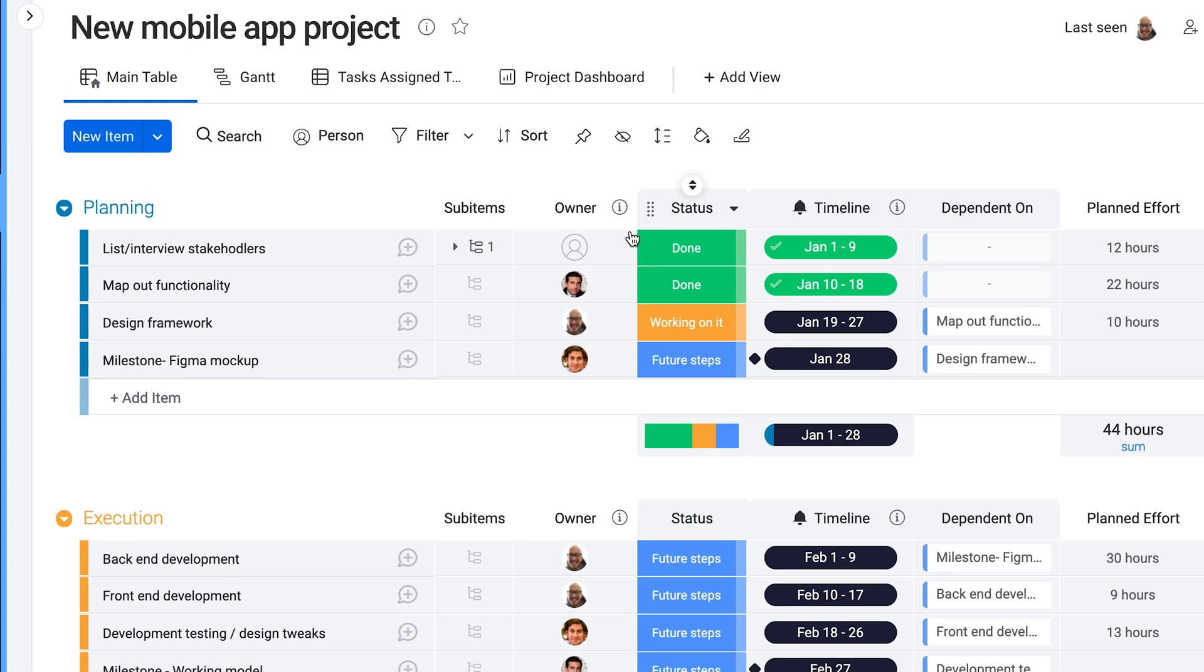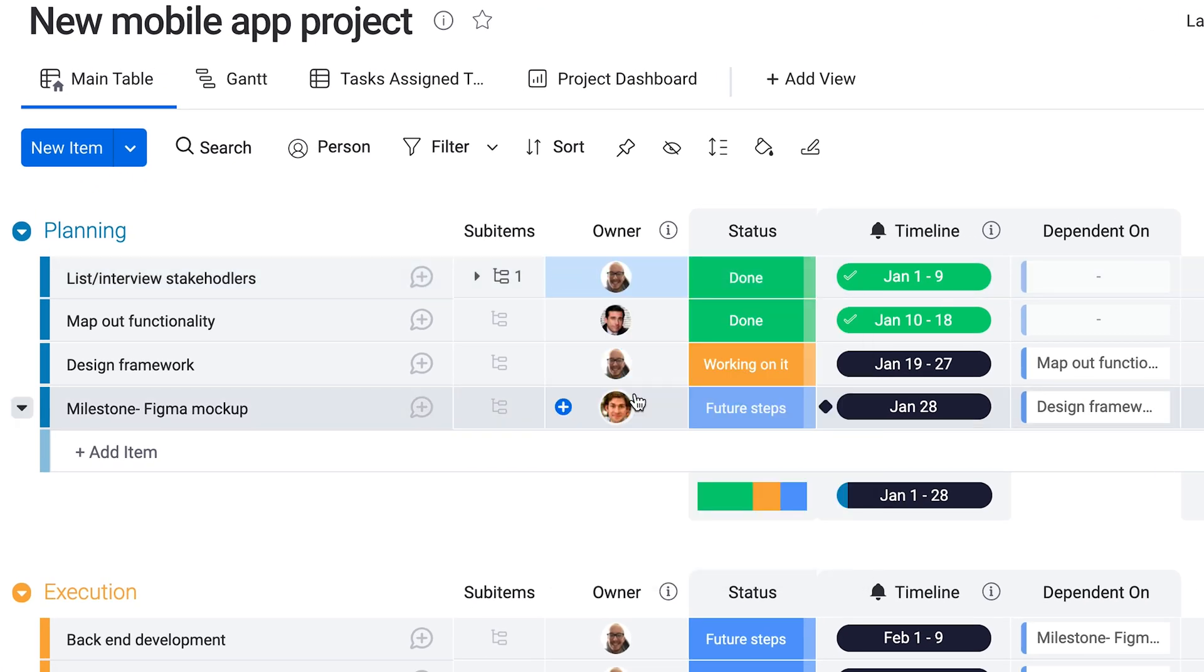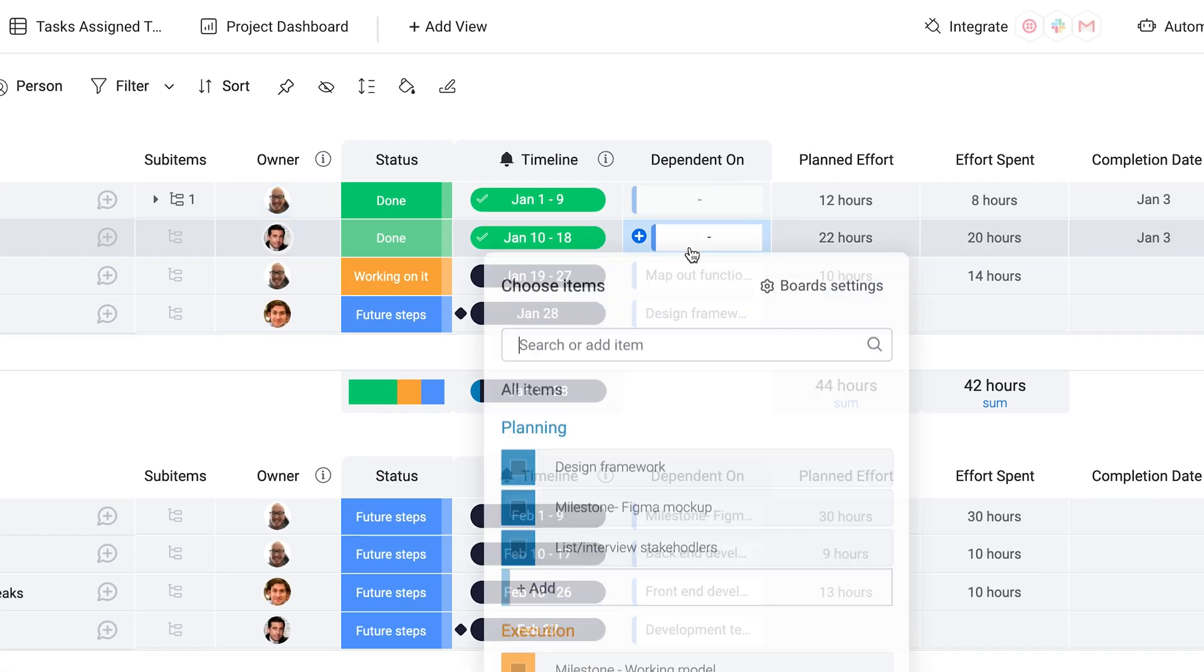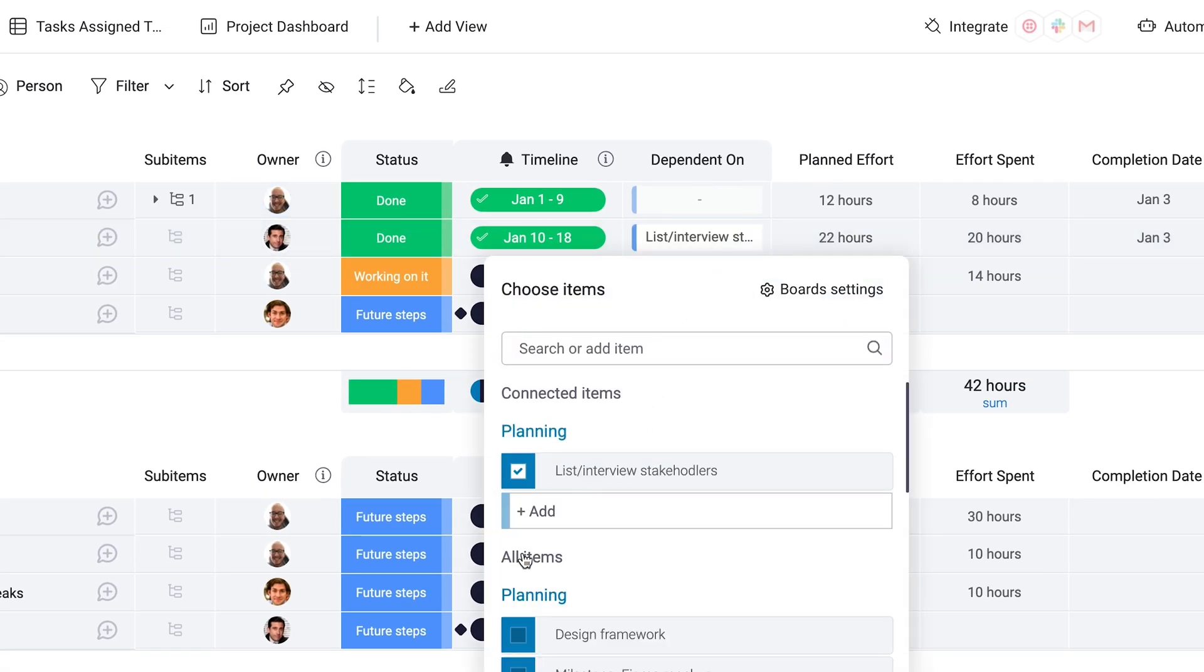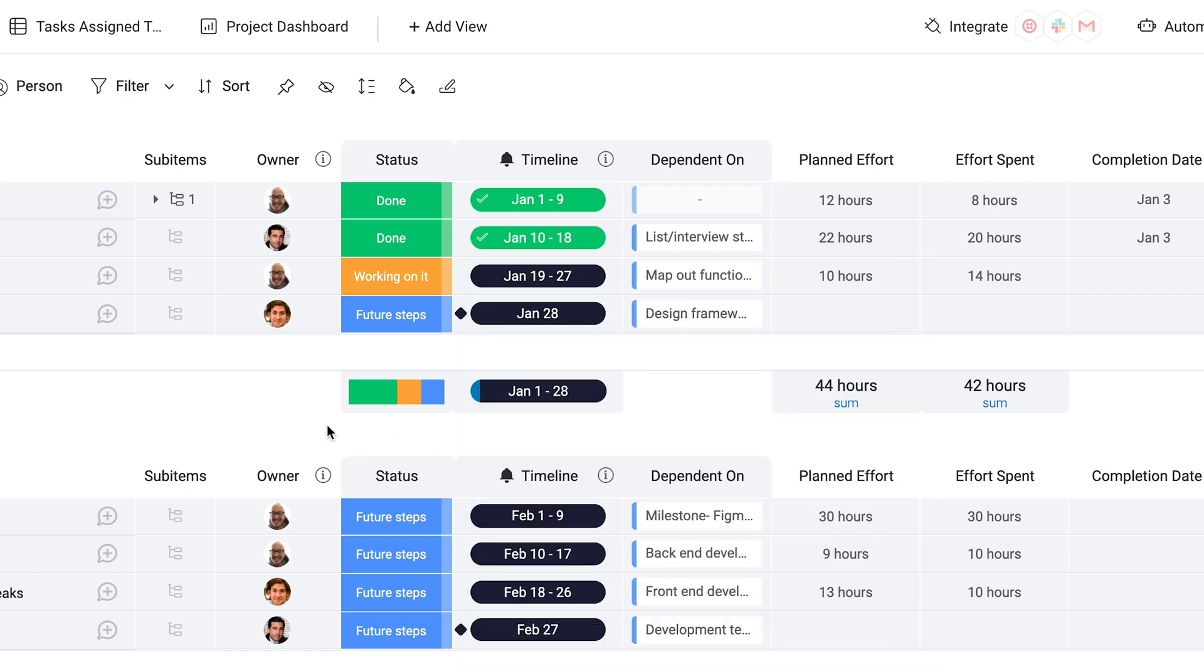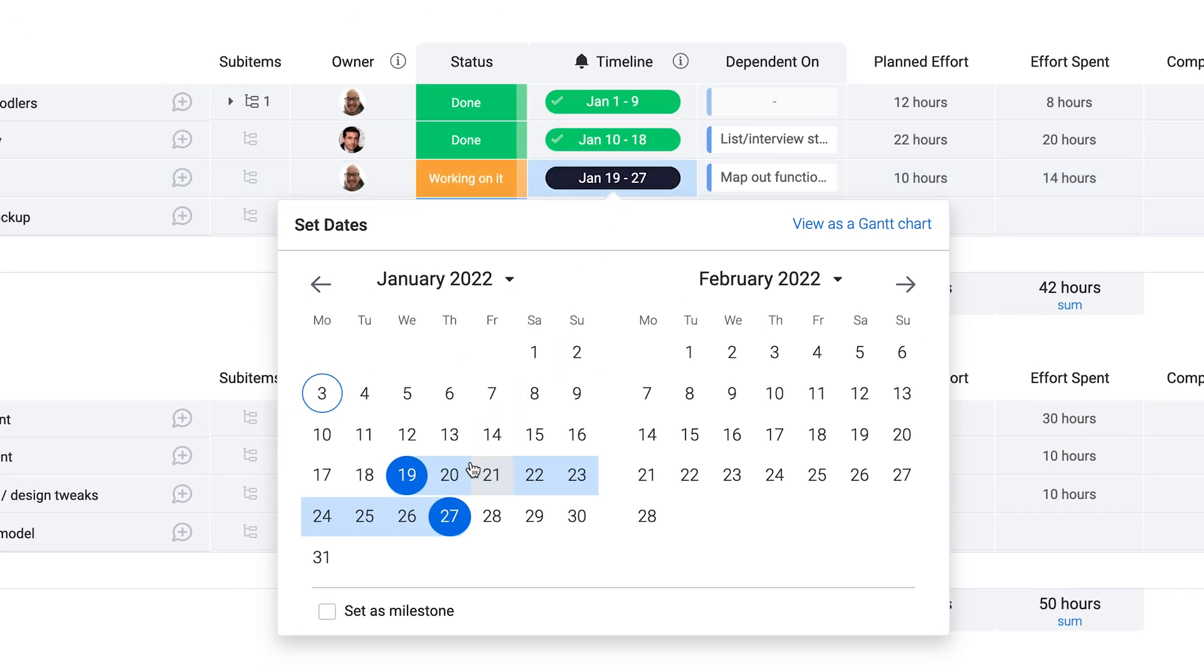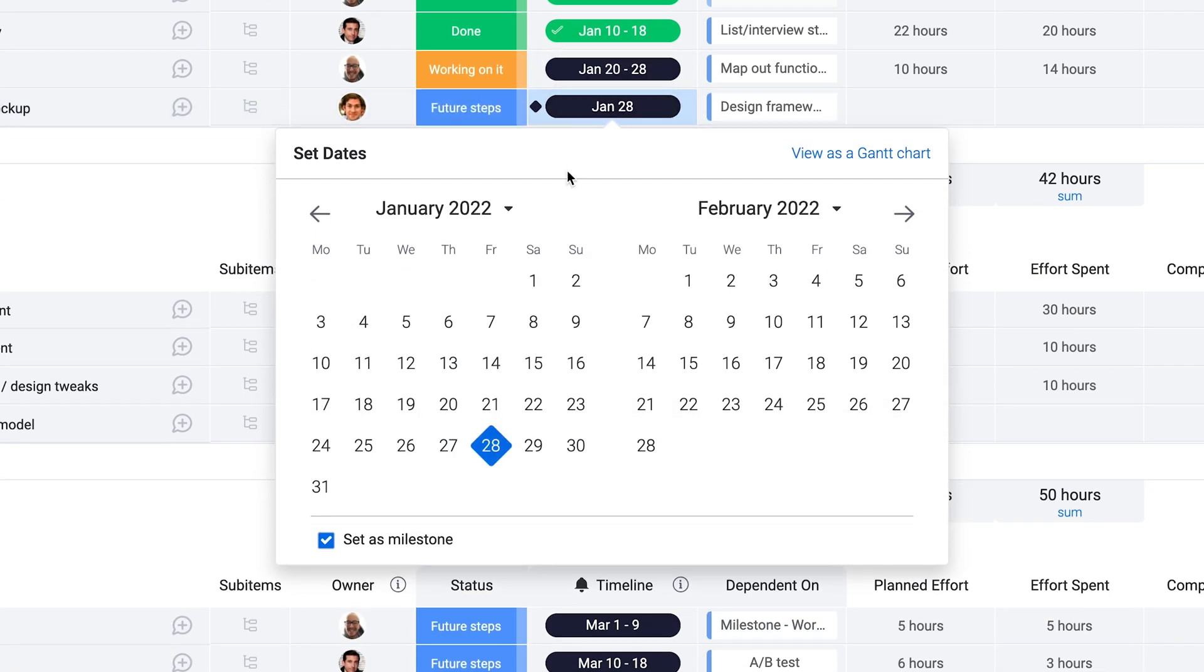We'll assign owners to each task, set dependencies, meaning this task is dependent on this task being done first, layout timelines for your work so you and your team can visualize the road ahead, and we use milestones to indicate key junctures in our project, which can be set when selecting dates.